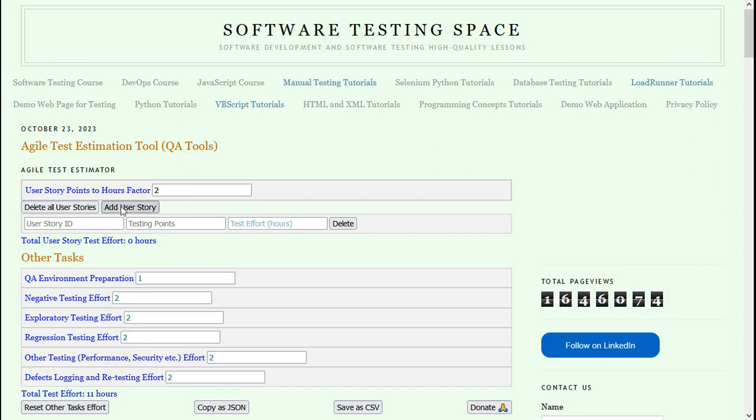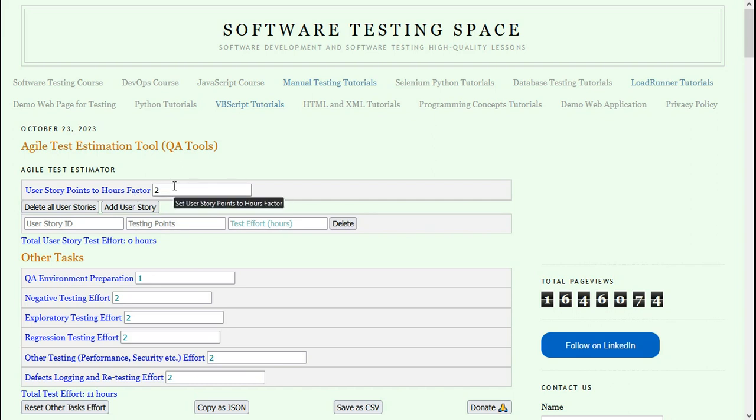First is user story points to hours factor. This is the ratio of the number of hours effort for every story point. I will leave it as the default value of 2 hours.